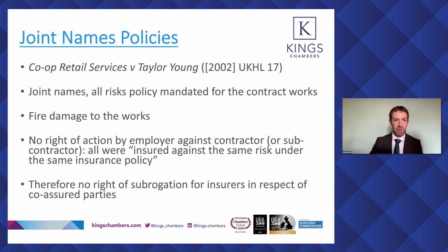A fire occurred, damage occurred, and no claim could be pursued by the employer against the contractor because those two parties were insured under the same policy against the same risk. It was actually, if you read the case, a case about recovery of contribution under the 1978 Act by third parties. I won't delve into all of those details.